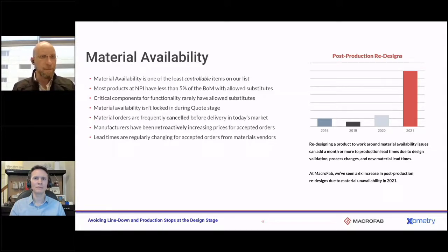And one of the things that we hear from customers all the time is, hey, when you quoted this for me, you locked in my material availability. No, that's not actually how that works. Your quoting process could take weeks or months, depending on the complexity of that product. And nobody locks anything in until there are purchase orders.